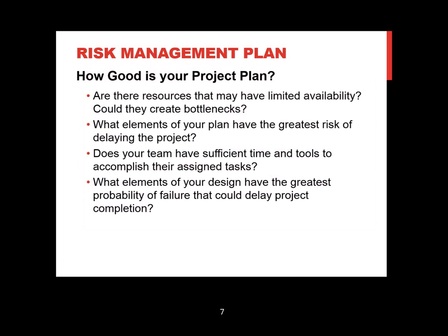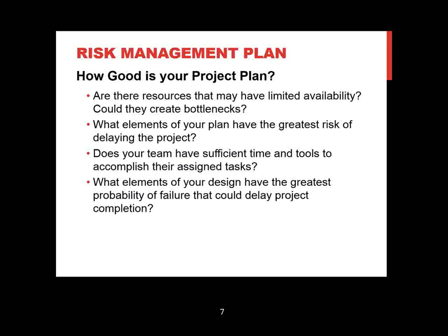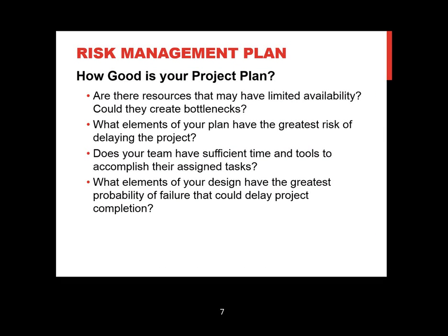How good is your project plan? That's a very good question to ask. Key things that you want to be looking for in a project plan is, are there any resources that may have limited availability? If yes is the answer, could they create bottlenecks in getting your project done? What sort of delay? What sort of risks do they have against your project being done on time?